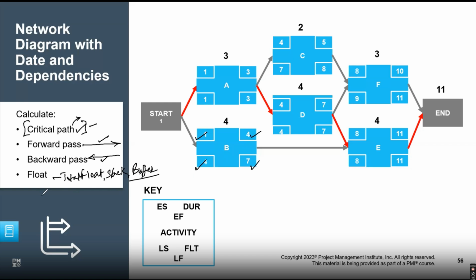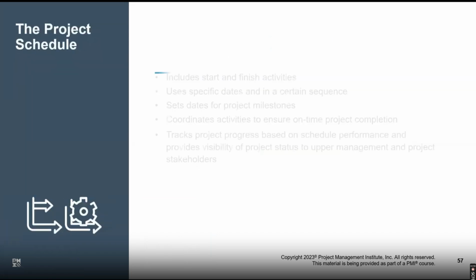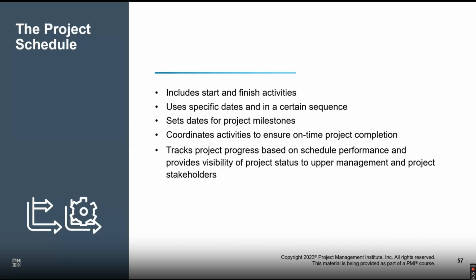Now, free float is more from the perspective of if you delay an activity, how long can you delay it without delaying the start of the next activity? That's what we call free float.